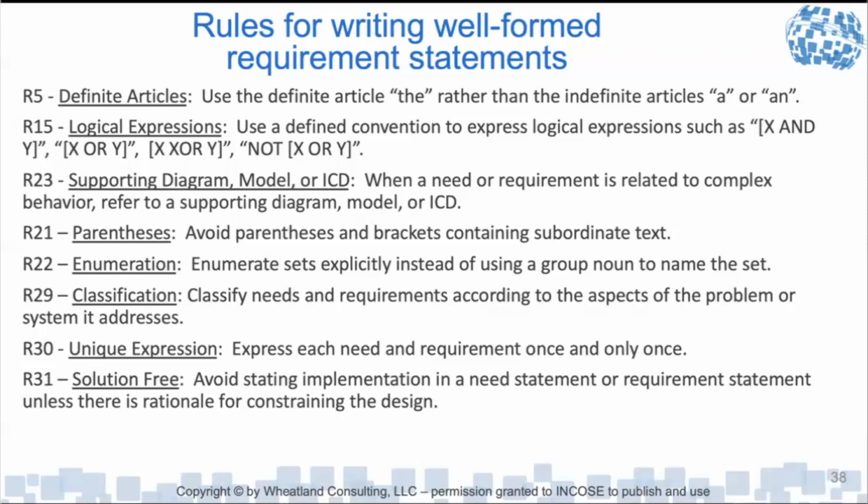And it turned out that with the modifications, it would have been cheaper to design an engine from scratch than to make all the modifications. When we have constraints, even though management says they want us to use that, what are the implications of that to the rest of the system? And then if there are some issues, we need to push back up the chain and identify what those issues are and what the impact on cost and schedule is by following that constraint, when you may have a cheaper, faster solution if you're not constrained in that way.